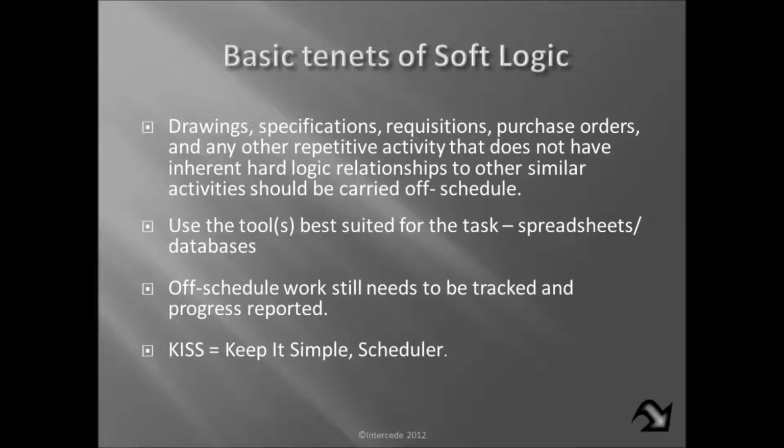Then a database seems to work really well for retrieving that data and keeping it all in one place. However, with all elements in soft logic, remember everything has to be tracked. Just because we're not putting it on the schedule does not mean we don't want to know where it is. So what we want to do with our schedule, though, is keep it simple.